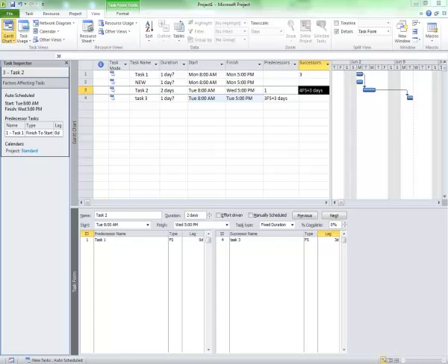What I want to finish out with tonight, so we've got all the basics with linking here, the mechanical part. The key thing is, don't type in the start and finish column. Save that till we cover the constraints in 2 more classes. Once you understand constraints, then you can type in start and finish and you'll understand it completely, because that's one way to create a constraint.